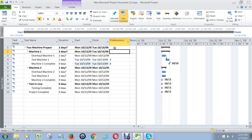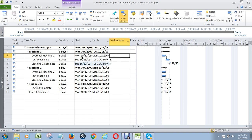Summary tasks like these never have predecessors either. So never put a predecessor next to a summary task. The only things that get linked together are the items that are not bolded in your project.